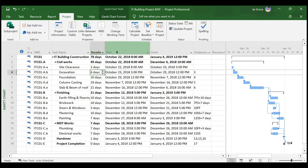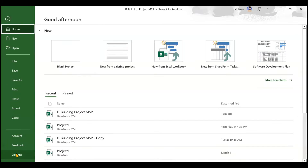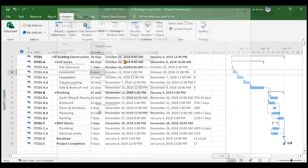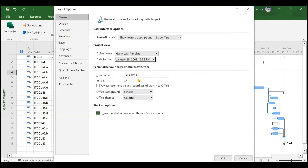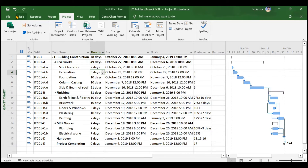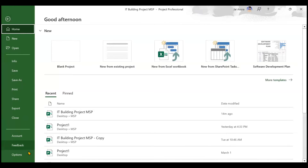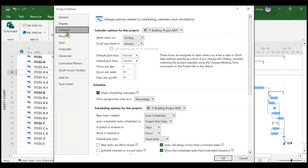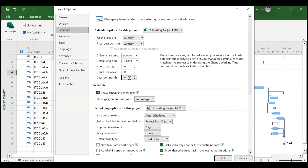If you are unable to see the time and date format correctly, go to File, then Options, and in Date Format choose the appropriate format and click OK. One more important thing: go to File, then Options, then Schedule. You need to change the hours settings. Right now based on the Standard Calendar it shows eight hours per day, but as per our IT Building Calendar it will be 10 hours per day and 60 hours per week, since work also happens on Saturdays.